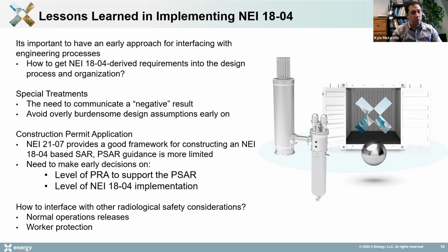For special treatments, just to recall, these are enhancements beyond typical industry practices that you may want to impose. This is particularly important for NSRST systems. I learned a very hard lesson, the need to over-communicate a negative result. We went through an iteration of special treatment development, looked through it, and didn't identify a lot that we saw was necessary at the time.